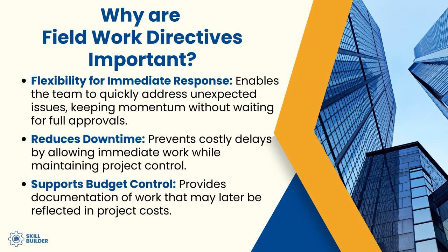It's also going to support our budget control because it provides documentation of work that may later be reflected in project cost. That's why it's so important that you use your construction experience to be able to identify and assess the situation and determine a lump sum amount not to exceed in that moment, so that you can give yourself enough time to be able to go back and really develop the formal forward projection of this particular issue.